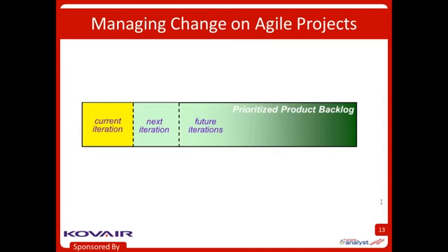Now, as stakeholders request new work, which could be new requirements or other tasks we realize we have to do, those go into the backlog and they're prioritized against the other contents in the backlog. You might come up with a requirement that you say, wow, that really has to go into the next iteration. That's important, or it's timely, or it's foundational, or whatever. And then other things can just wait for the right time. So work that's not yet been allocated can be reprioritized or removed from the backlog at any time.